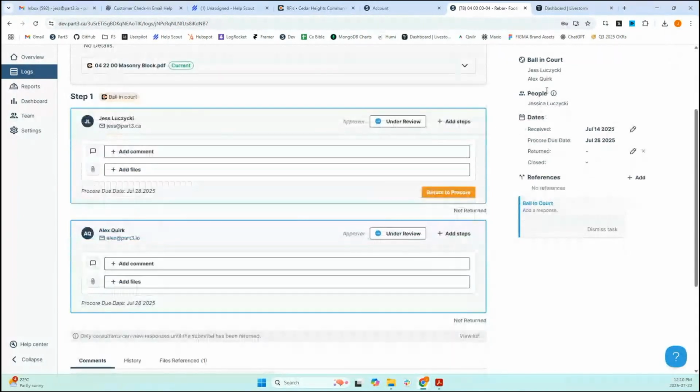Normally, a workflow that we do suggest, but not every general contractor goes for it, is that if you're a true prime consultant, meaning that the other consultants work for you, only assign submittals and RFIs to you. And then you as the prime can dictate who it goes to. It gives you a little bit more control and it helps you navigate things because at the end of the day, you're responsible for those consultants anyways. So let's make sure that you have that control.